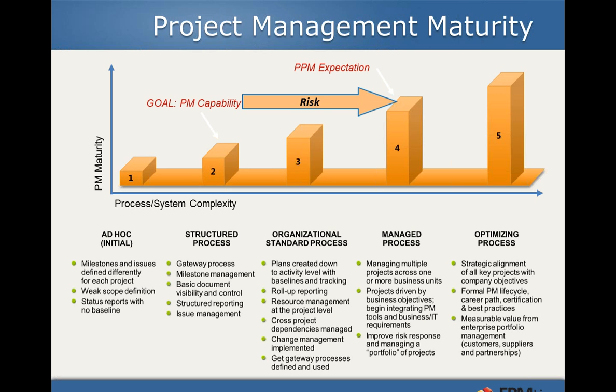We could get the system up, we could get it configured, and it could all work technically, but if we overshoot it, it's probably not going to be sustainable for an organization that's really only at a level 2. So the key is, if we overshoot too far from where we're at in our maturity and the capabilities of the tools we're putting in place, the risk of failure is really the gap between where we're at and where we're shooting for. So the idea is we want to stretch the organization incrementally. We don't want to break it or set it up for failure.